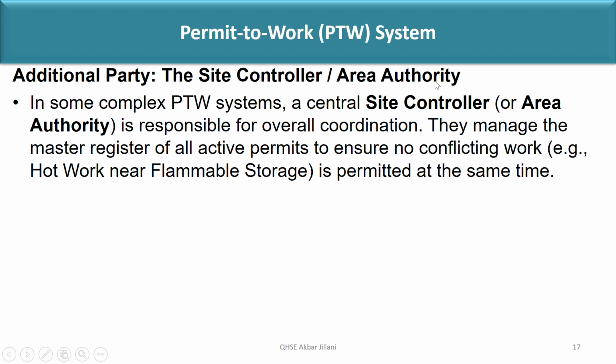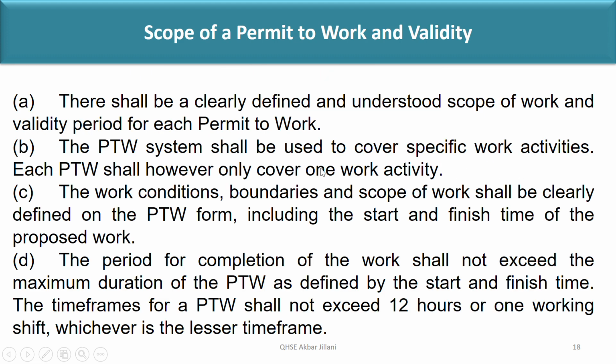Additional role: the site controller or area authority. In some complex PTW systems, a central site controller or area authority is responsible for overall coordination. They manage the master register of all active permits to ensure no conflicting work, e.g. hot work near flammable storage, is permitted at the same time.